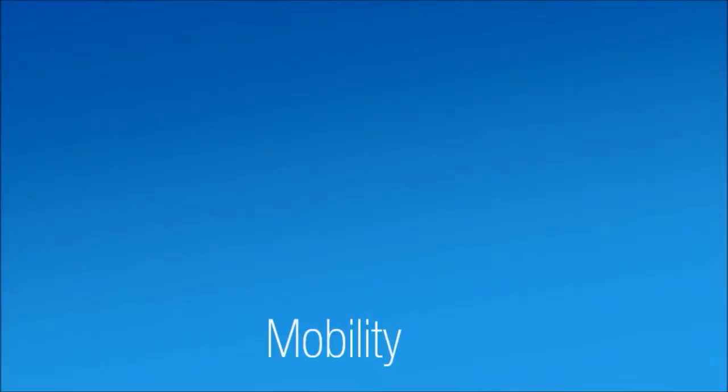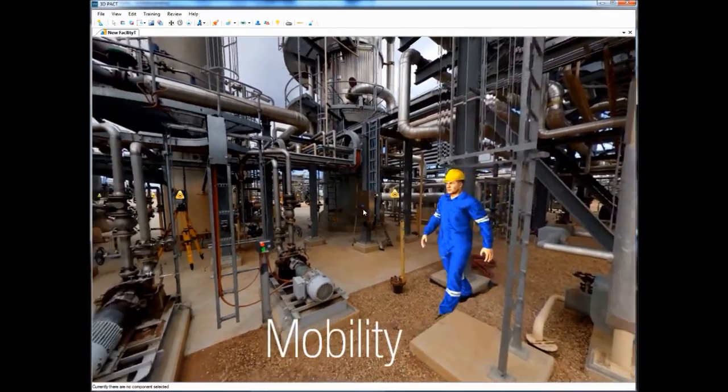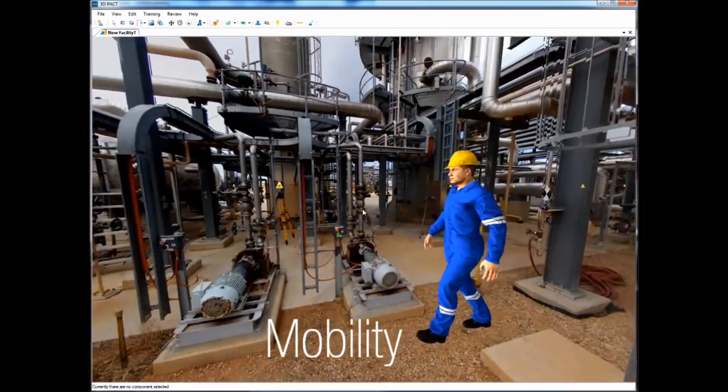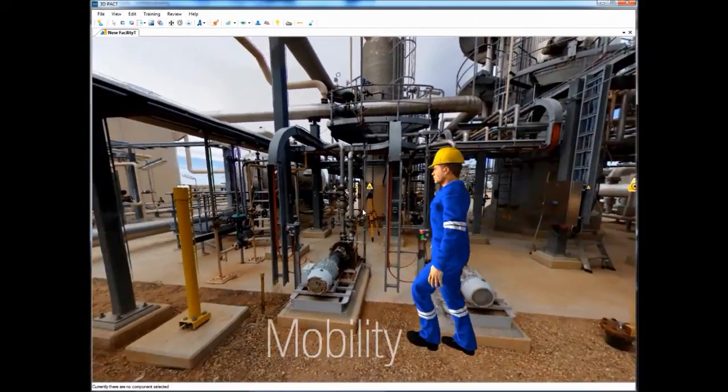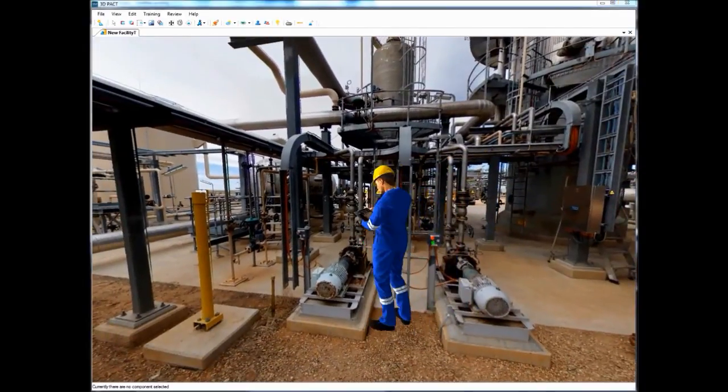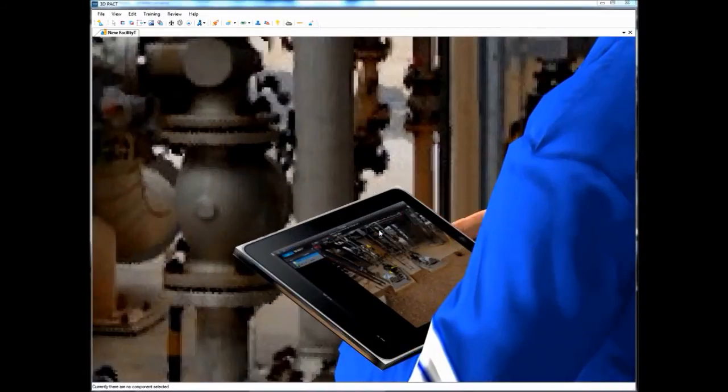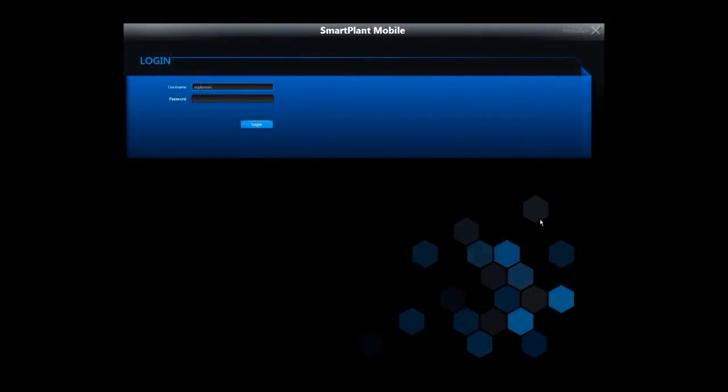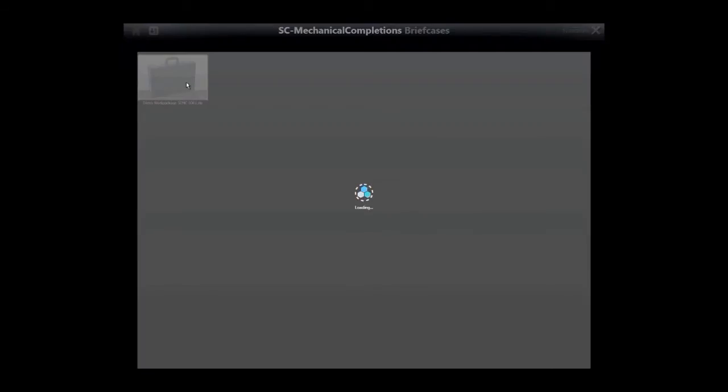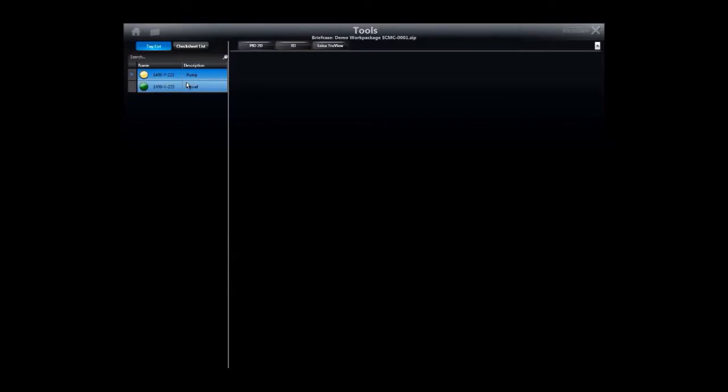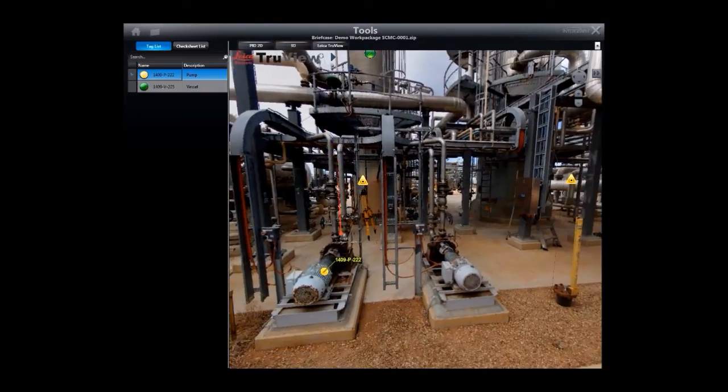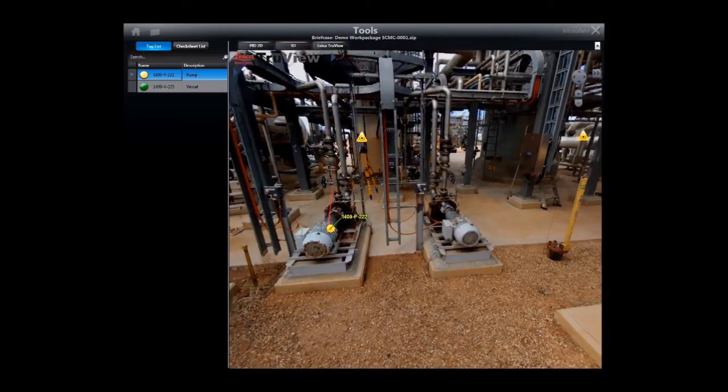Systems completion is performed on-plant, so it makes sense to take work packages into the field on a tablet. This is much more efficient than the hard-copy printed checklists of legacy systems. Work packs are downloaded from SPE Systems completion into a mobile PC as briefcases, that contain all relevant work instructions, tag lists, drawings, checklists, 3D models or laser scans.